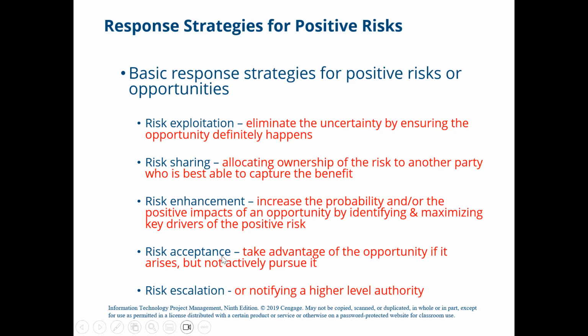The next is risk acceptance. Risk acceptance, as the name implies, means to take advantage of the opportunity if it arises, but not actively pursue it. We can understand this again with the help of the same example of our opening case. For example, the computer classrooms project manager might assume that the project will result in good public relations for the company, and he does not feel compelled to do anything extra, right?